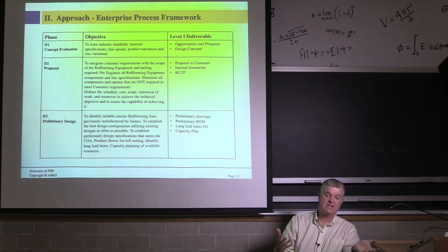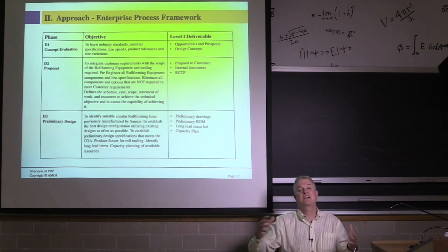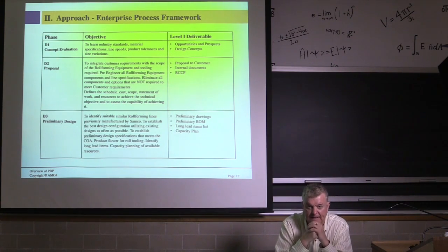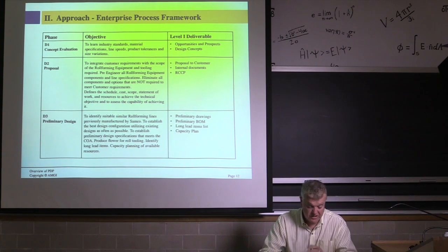Basically, hey, we got this possible order. They want it for September the 1st, and it's now March. Do we have the capacity where we can actually build that thing on the shop floor? Do we have the capacity in engineering? Do we have enough engineers that can design it? Have we done it before? Can we use previous designs to cut corners? Not just cut corners, but to save money. The less engineering effort, the better, right? The less time you spend on developing a particular product because it's been done before, then you're saving money.